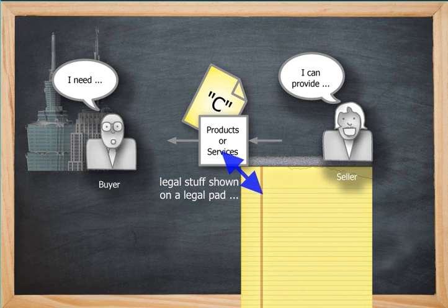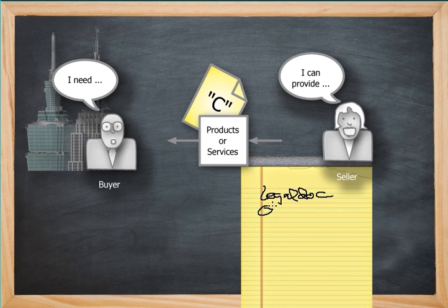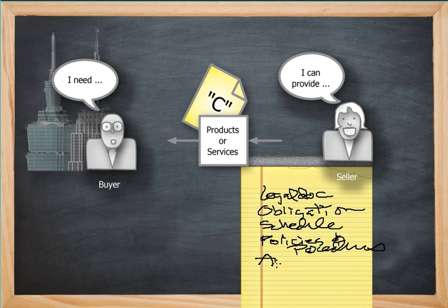All right. So what are some of the characteristics of a contract? Okay, for one, it's a legal document. It also obligates the seller to provide the specified product or service and obligates the buyer to provide the agreed upon payment or terms. What else? A schedule is always one of those, for delivery and quality according to expectations. There must be an adherence to policies and procedures. There's also authority in terms of who is able to sign for both parties.